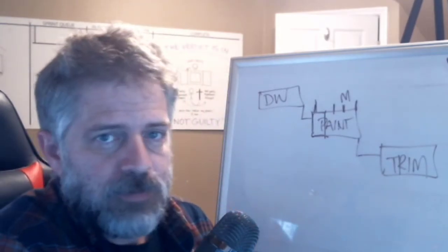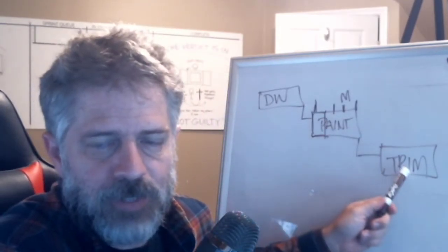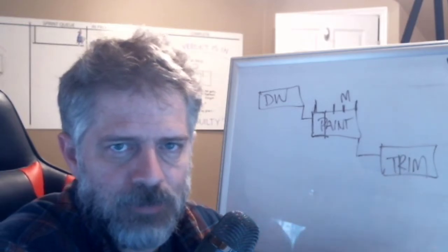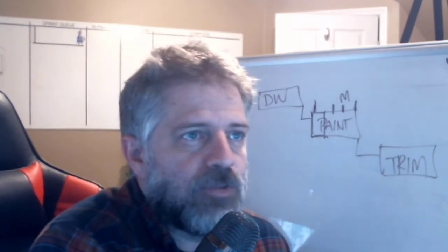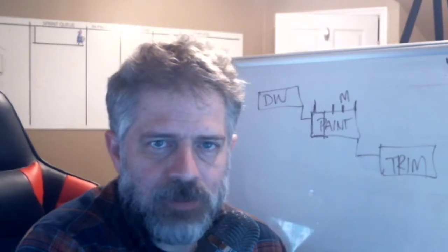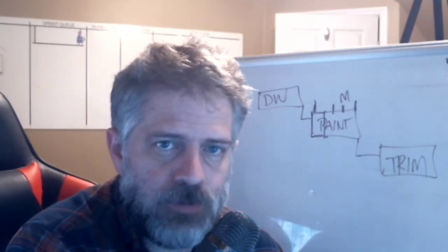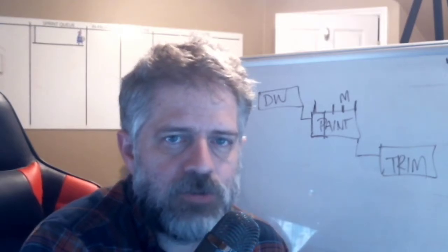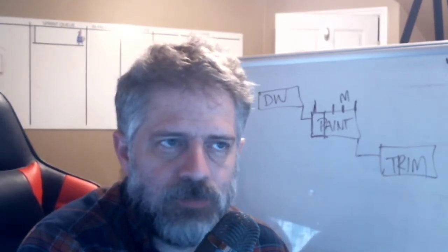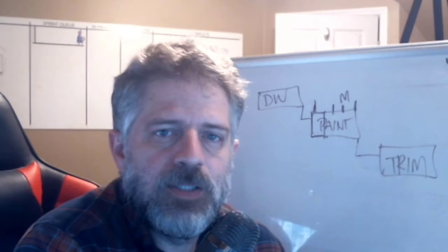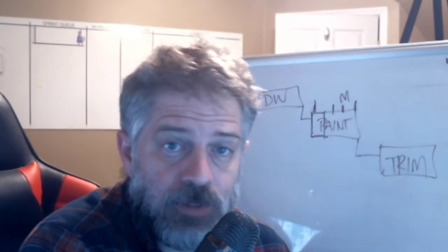So imagine, I added 200%, and then I have to do the same thing with the trim carpenter, the same thing with the next guy. And for the most part, you're expanding. They're adding margin, and then I'm adding margin, and now the Gantt chart shows a 8 to 12 month build because there's all this margin in the wrong place.